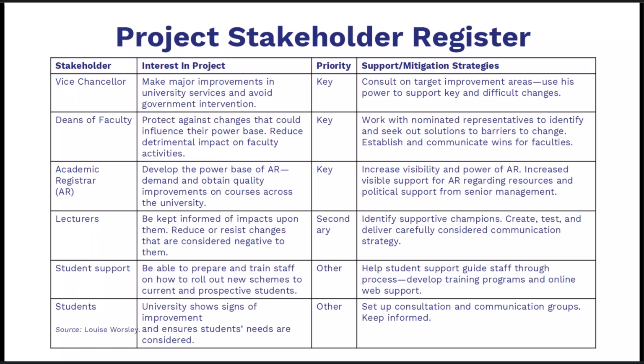For example, training, workflow pilots, downtime procedures, data quality checks, privacy controls. Keep the register live, assign owners, set review dates, and link it to your communication plan, risk log, and decision record, so priorities translate into concrete actions.